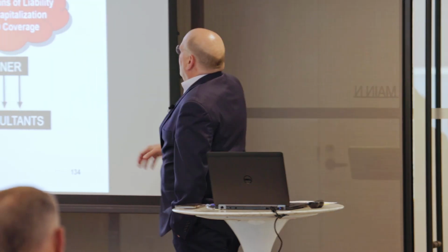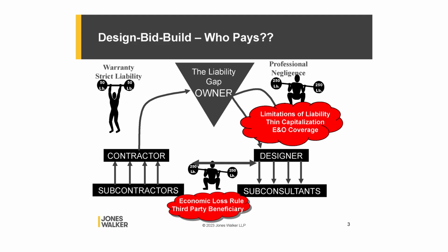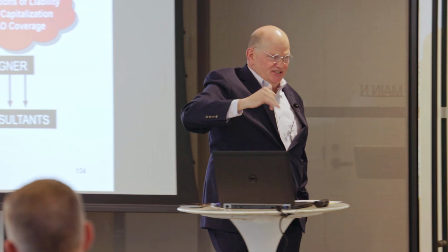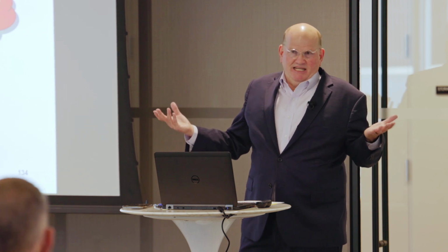Just a couple things to think about, further compounding the liability gap that the owner has to cover. You have issues related to limitation of liability, which you're probably going to have to some extent if you're talking about de minimis design fees on some ginormous multi-billion-dollar project. The other thing with some of the very large publicly traded engineering companies now that do a lot of at-risk work, probably less of a concern, but if you're talking about an architectural firm where their main assets are probably rented offices and some computers and their people, they're just going to be thinly capitalized.